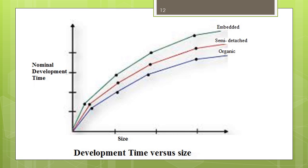The development time versus product size in KLOC is plotted in this graph. From this graph it can be observed that development time is a sub-linear function of the size of the product — that is, when the size of the product increases by 2 times, the development time doesn't double but rises moderately. This can be explained by the fact that for larger products, a larger number of activities can be carried out concurrently by engineers, reducing the overall project completion time.